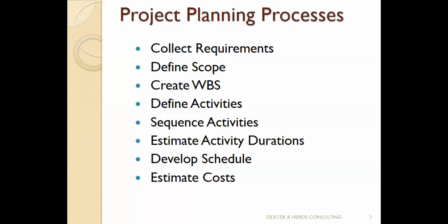The next thing I will now do is to come up with a document in landscape that shows in a table the activities, the duration, the start date, and the finish date. That's what we now call the schedule. You develop your project schedule. Once I know my working timetable, that's the name I give it, project schedule, I begin to ask myself, how much will these activities cost?